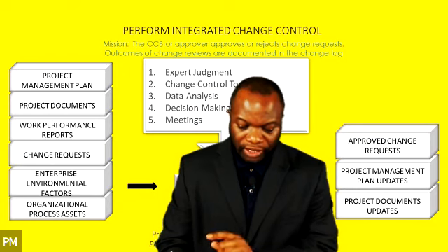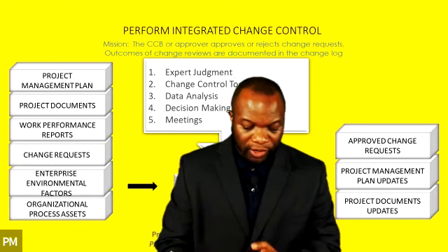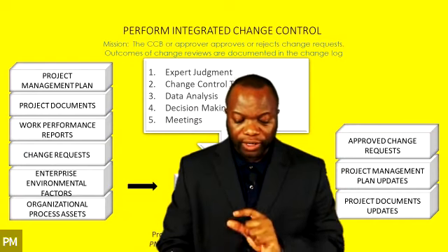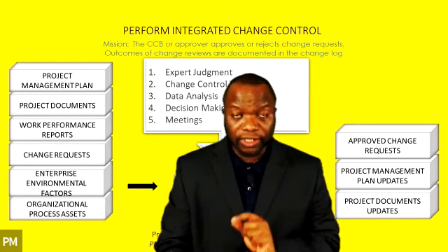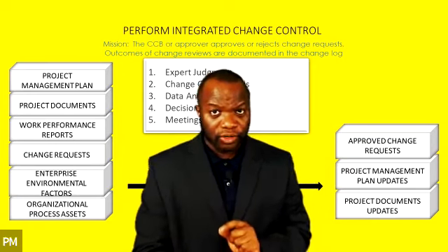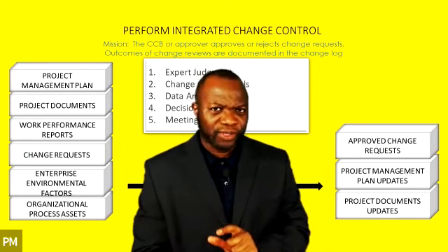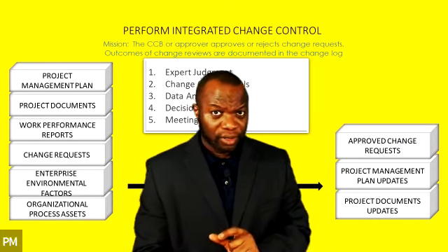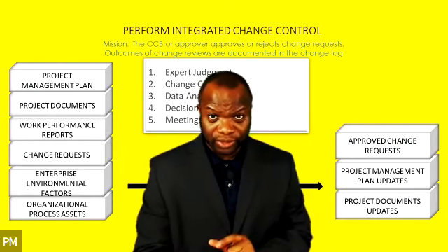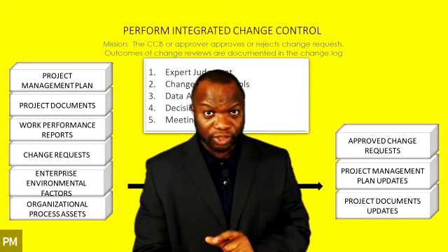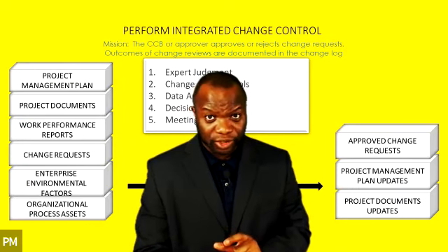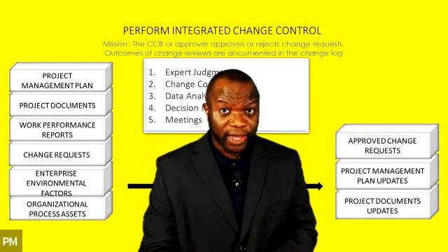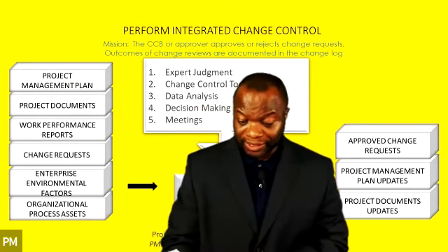Okay. And then on the fifth line, the word always there is important. It says, whenever a change request may impact any of the project baselines, this is from line 4, a formal integrated change control process is always required. Do you get what I'm saying? Is it making sense? I hope it's making sense. Give me some assurance that it's making sense to you, because page 115 is loaded. We ain't even started talking about the ITTOs.